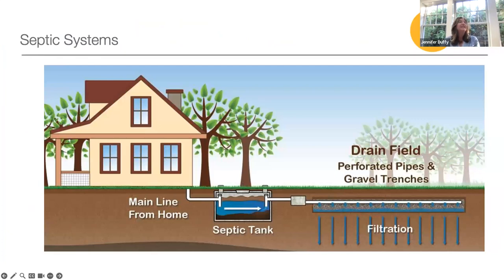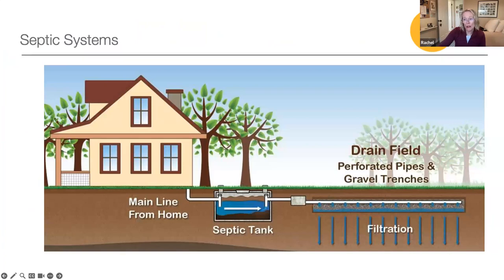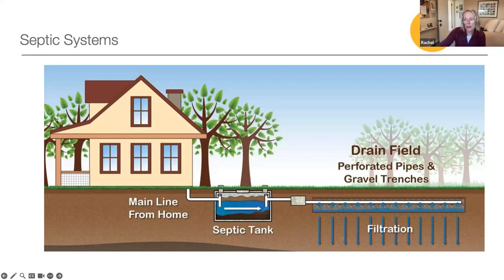That brings us to septic systems. Your ability to create an ADU or junior unit entirely depends on whether the system is prepared to handle the additional waste. The only way to determine that is to learn more about your septic system. It must be understood and a plan must be put in place to expand it before you can take any action on creating an ADU or junior ADU.